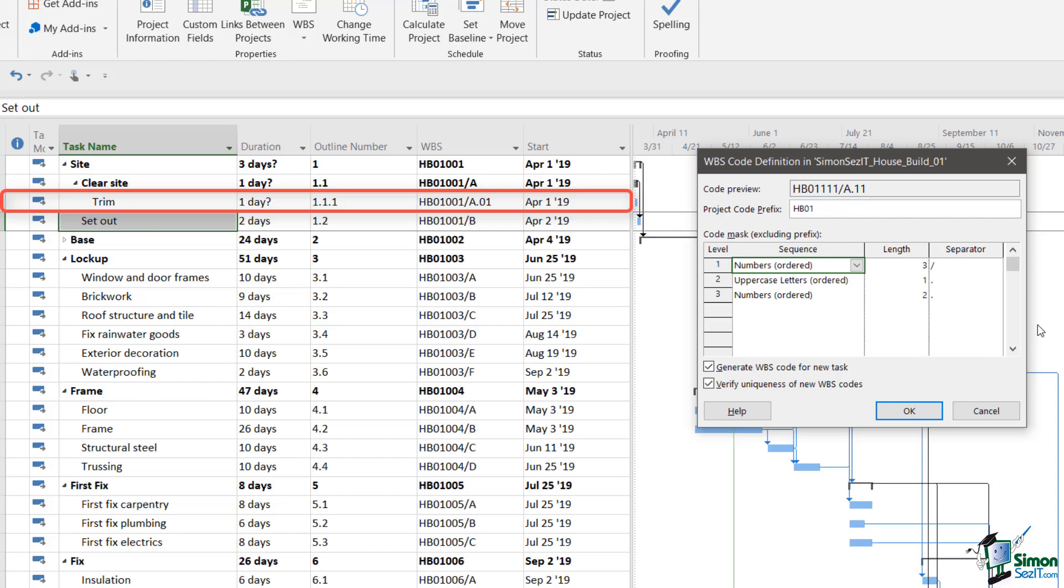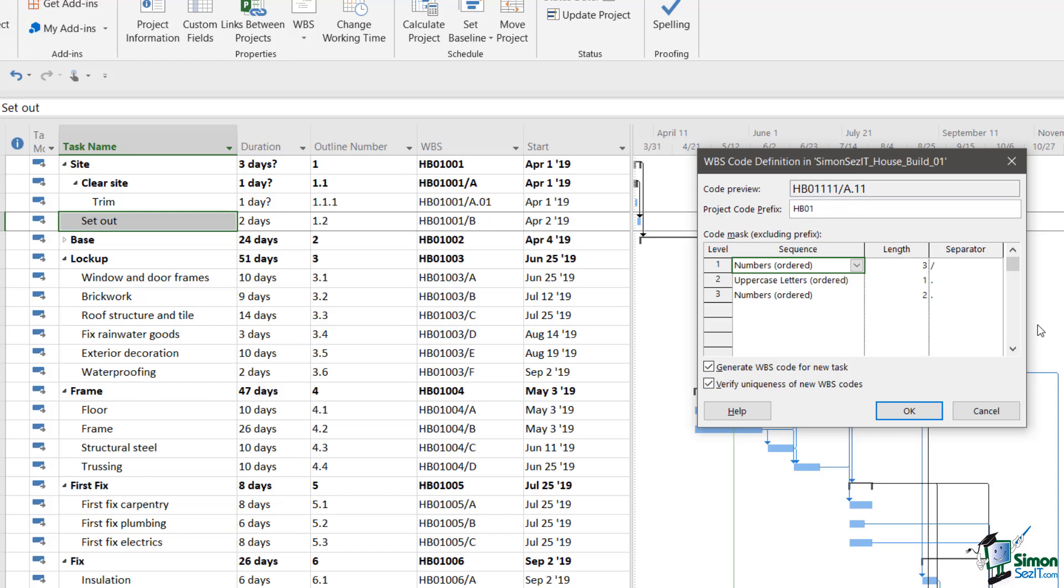Now, although I specified a separator at the third level, because there was no fourth level component for this particular WBS code, because it's only going down to the third level, then I'm not getting that separator at the end. Project 2019 knows whether it needs to put in a separator or not. The next task in the plan, of course, project prefix the same, HB01. The first outline level is the same, so I get 001 again, slash again, but the second level is different, so the letter is B.